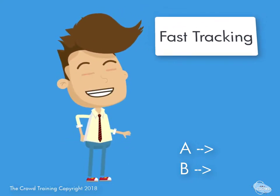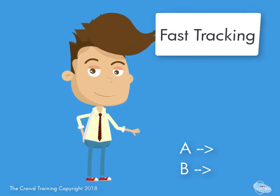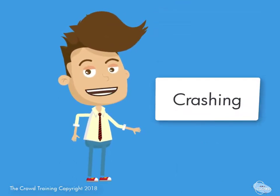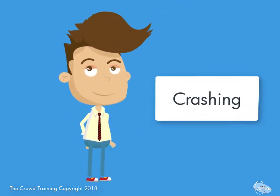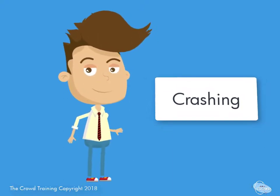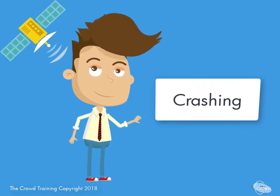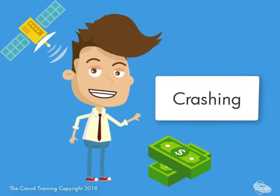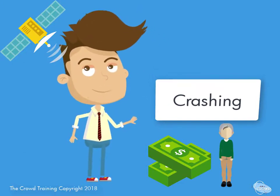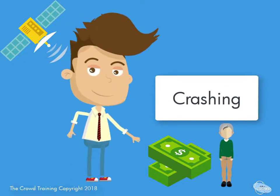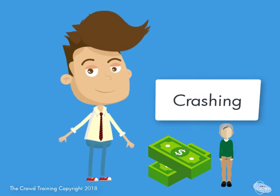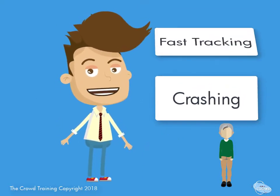That's what we refer to as fast tracking. Now the other one is crashing. The crashing technique means you are throwing more things at it — more resources, more budget, more costs, more people, whatever it might be — to speed things up. Obviously that would cost money, and you could do both in tandem or a variation of each.